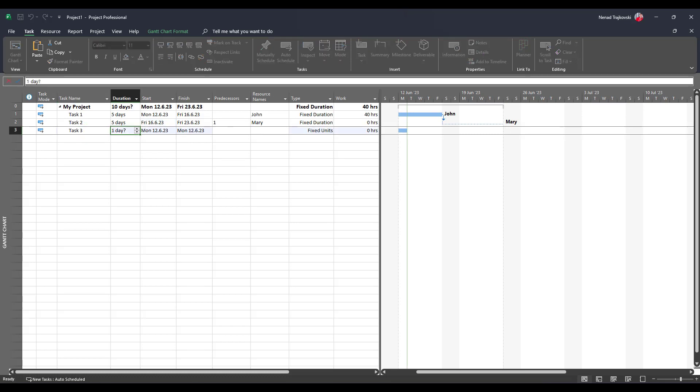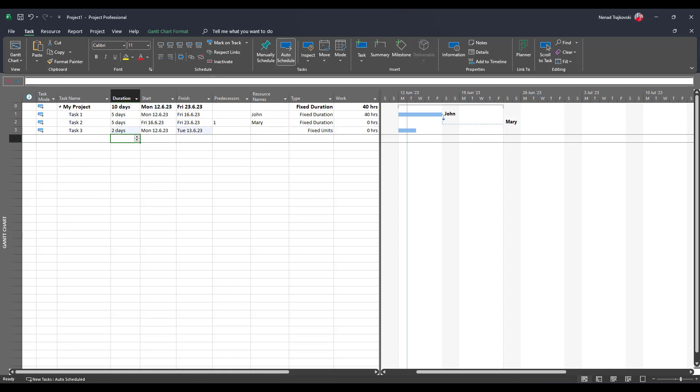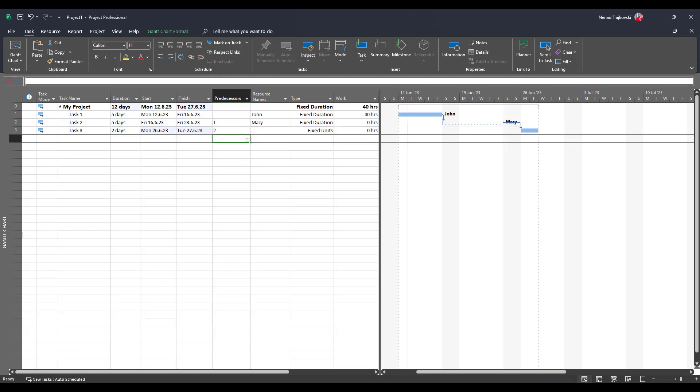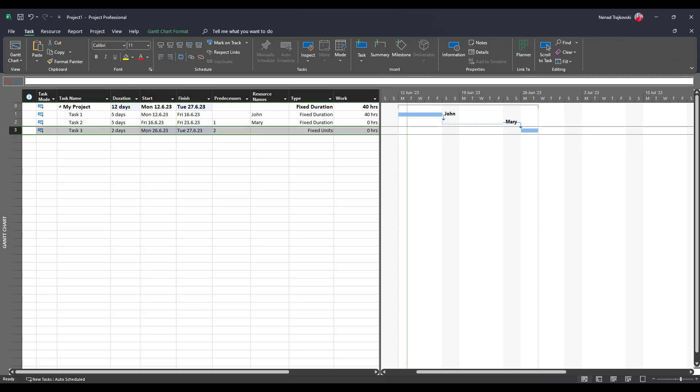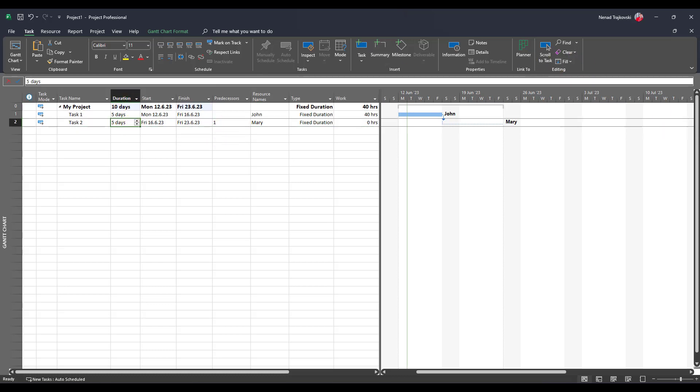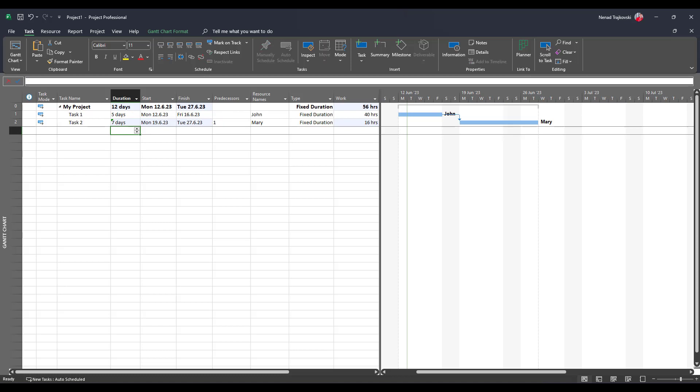And if I say two days and task two is predecessor, no one will work on this task two but it's still placeholder. Now let's say that for some reason, okay, task has seven days duration. Now you will see that Mary is going to work 16 hours during those seven days.